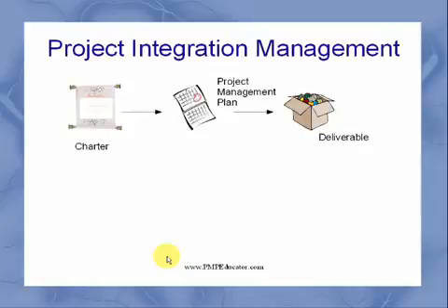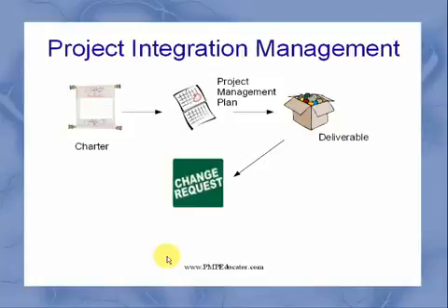And then once you have a deliverable in the execution phase, you are also monitoring the quality, and you find that there are some bugs or some features are missing, or you want to add some new features, then you have a change request.